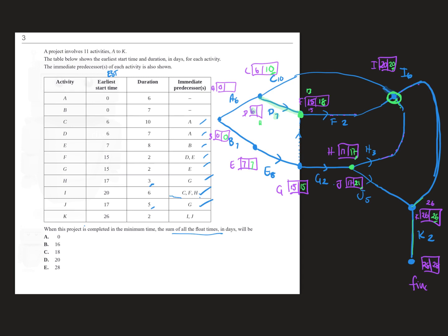So 10's the smaller one here because there are 2 joints. Oh, sorry, I'll still put in 11 in there. But when I go to move off, I'm going to take 10 because 10's the smallest. So 10 minus 6 is 4.